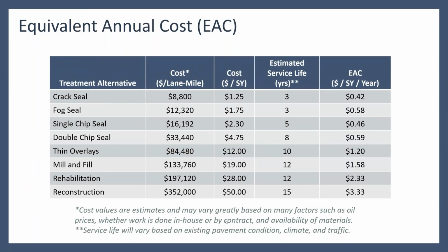Your availability of different types of materials will affect it. Even some road departments will put personnel salary monies. Some places don't count that toward the cost of a project, some do. So that can make a big difference. And then I've also listed here estimated service life extension in years for some of the different types of treatments. This is very dependent on, again, putting the right treatment on the right road at the right time. It also depends on climate and traffic. So depending on your particular situation, you really need to develop a chart like this for your area.